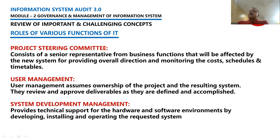User management owns the project and the resulting system. They review and approve deliverables as they are defined and accomplished. Before a project starts, we define deliverables — what the project team is going to deliver to a particular department. The users, who are the actual users, will review and approve that the deliverables are done and accomplished as promised.